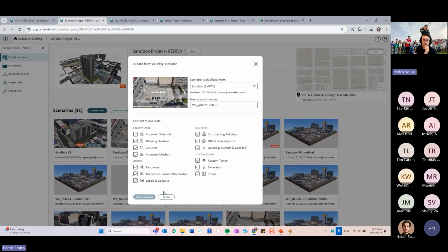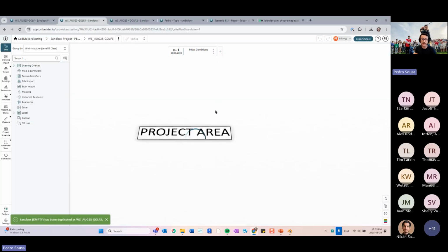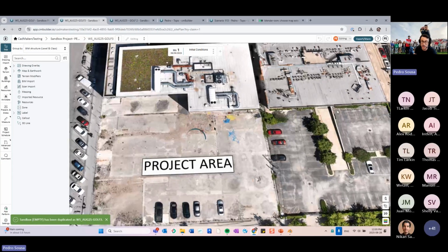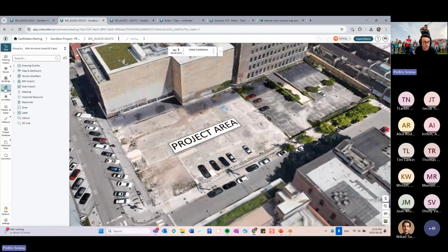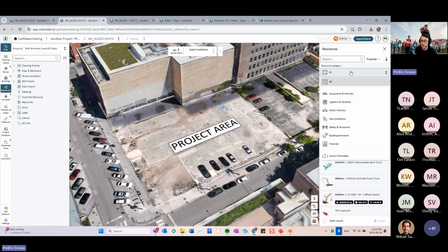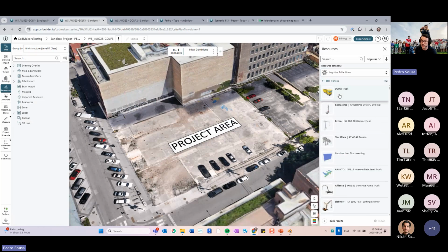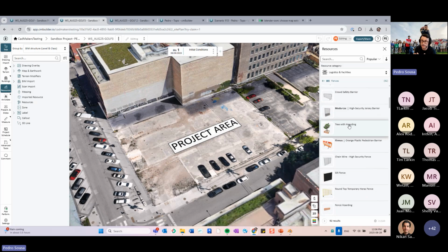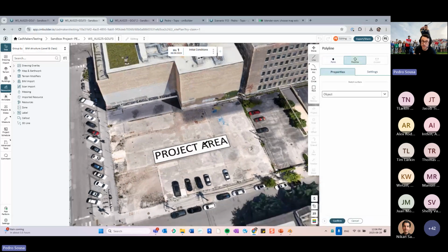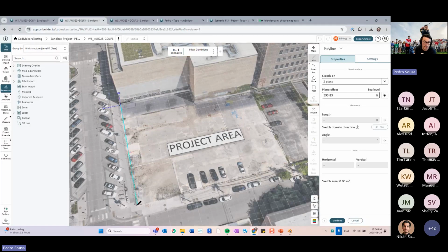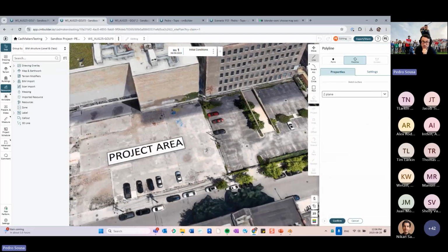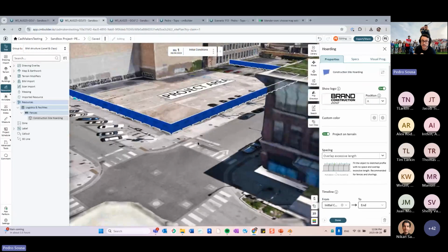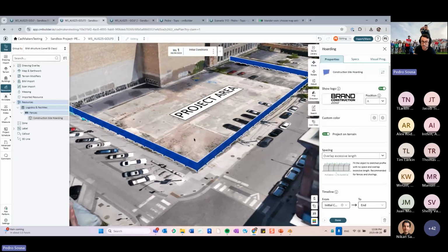Golf 3. Okay, cool. So site safety, site fencing and hoarding, right? You're gonna find in our library a lot of fencing types of resources. Most of them would be over here inside the resources, under the category logistics and facilities, and fences, right? These fences have different types, and you can start with one and then change it to another one. I'm gonna quickly place this because it's quite basic, so we can start building our site safety plan together. Okay, so through my fence, then I'm gonna check with my team what else I need to place over here in terms of hoarding.